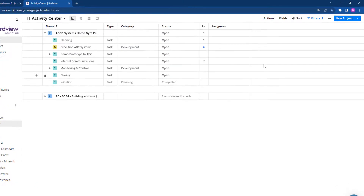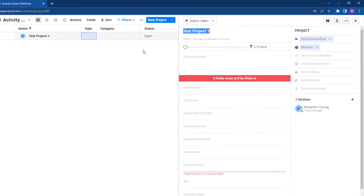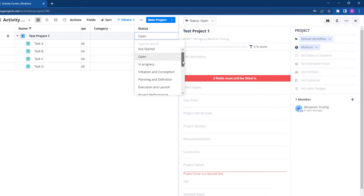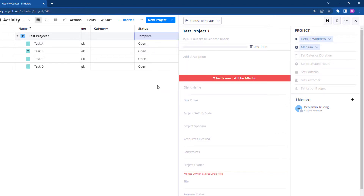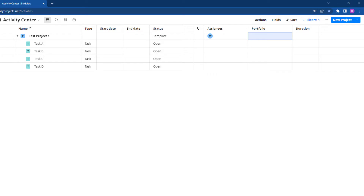Shifting to project planning, project managers can choose to create a project from scratch by simply adding a series of tasks to perform. If projects with similar tasks are performed on a recurring basis, you have the option to save these projects as a template. The template will also save predefined information such as resource assignments, duration or task start and end dates, pre-assignment to a portfolio, or a unique workflow that this type of project would apply to, and so much more.